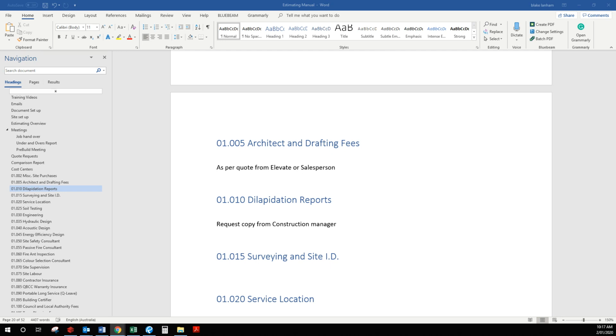So I wouldn't put that sort of repair cost in the actual project. I would actually do it as a separate cost and just say, look, we can see that the easement down the side here is damaged. I suspect that we'll need to fix that for council. So that would be the additional cost.